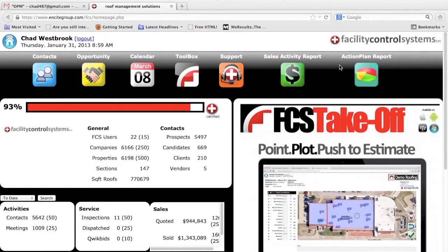Now, every time a capital project is put through a roof replacement, or even at this part, we can even push through multi-day repairs. We can push that through something called operations. It allows us to create something called an OPM. It's online project monitoring, but also to distribute emails to our clients or anybody that you'd wish inside your company on the daily progress that takes place on that roof, which will include a percent complete bar, the photos that are necessary for the day's work, comments, a progress report, everything that your client needs to be able to stay up to date on what's happening with that roof replacement project.